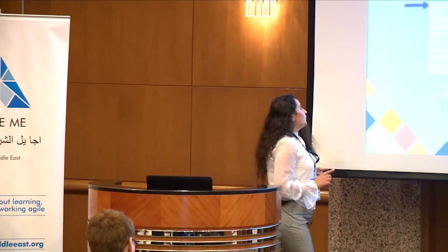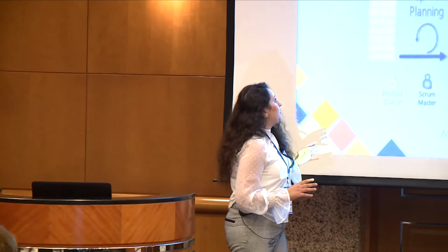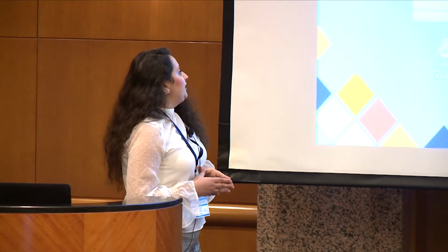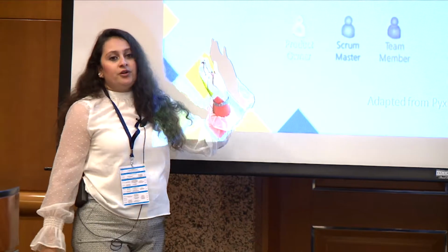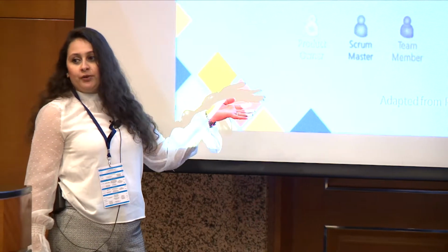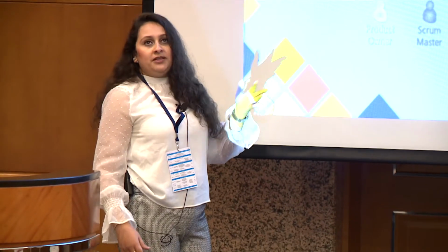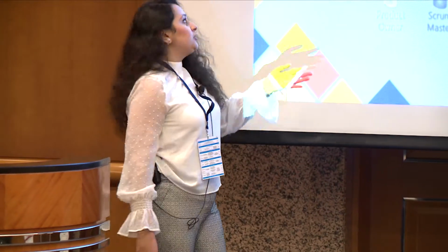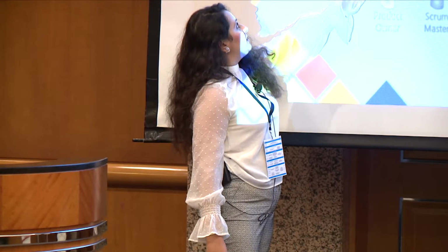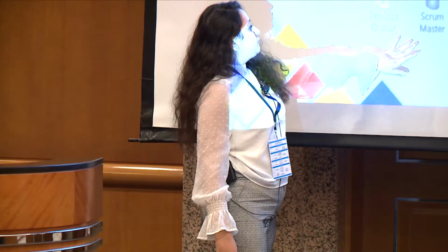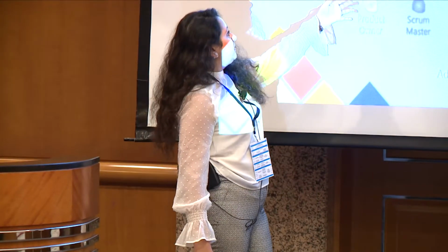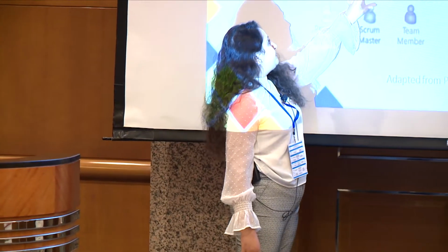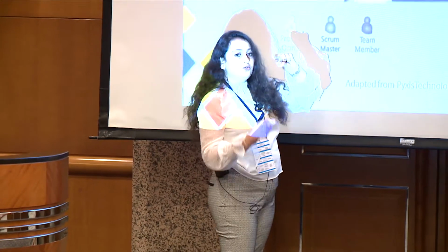On the other side, we have Agile. And this is presenting Scrum as an example of a methodology in Agile. And here we have the product backlog. Product backlog is just the set of requirements the product owner comes with. He wants to build a building, or he wants to make software. So all these things represent the product backlog. Then it's given to the Scrum Master, who makes the sprint planning. And through this planning, he's making sprint backlogs to separate.